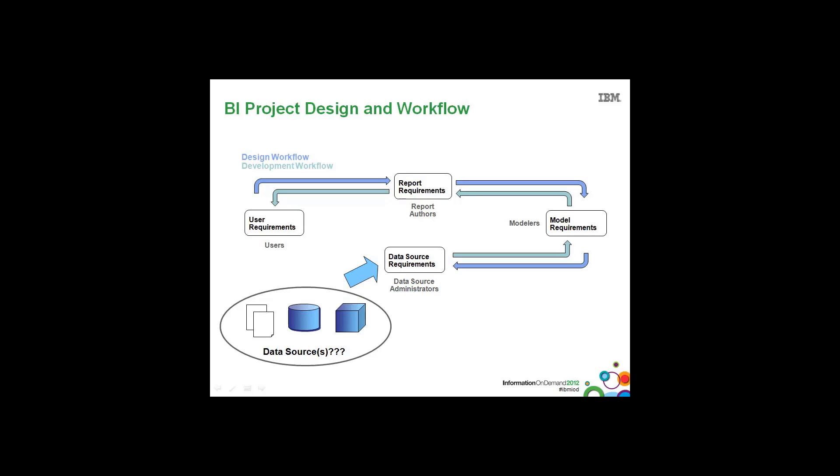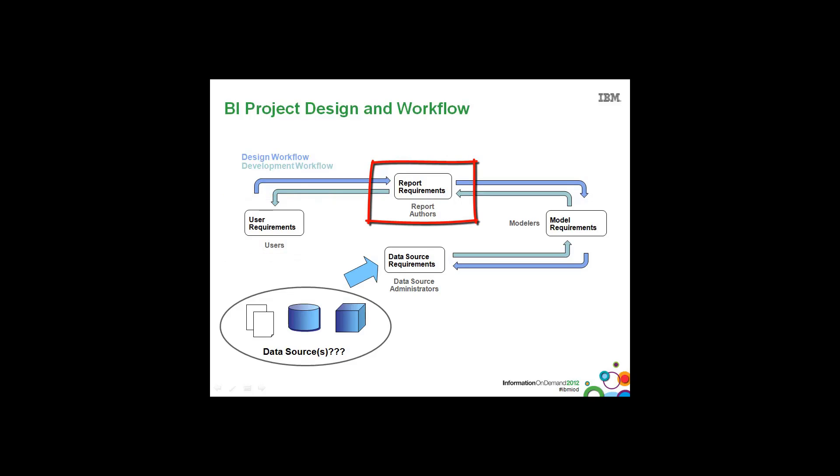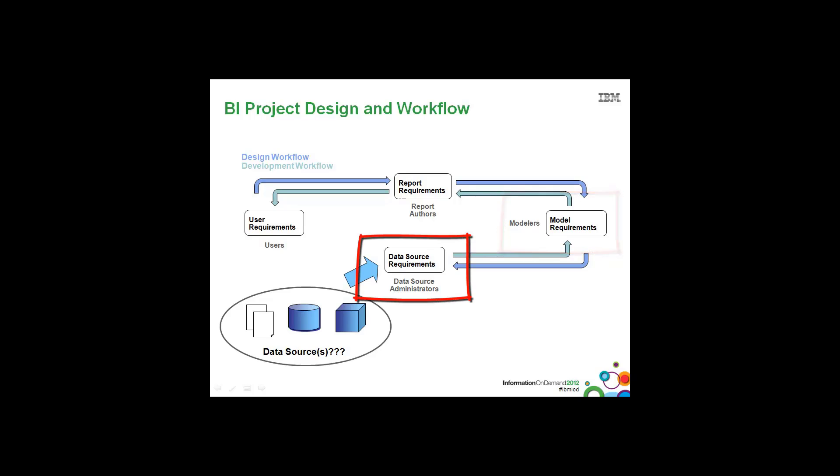And before we define any data access strategy, we need to look at project management in general. And for a BI project, we need to gather the user requirements first. The user requirements will feed into what the report requirements will be. And based on what the report requirements will be, we will define what the model requirements need to be. And the model requirements will dictate what type of data source we need to go after.